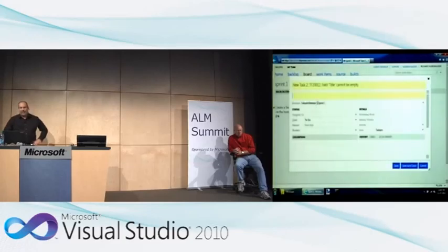Let me just bang out 2 more quick ones. So someone needs to actually build the Twitter control. And you can have a discussion now during sprint planning. Do we buy that or do we build it? Because there's a lot of Twitter controls out there in open source land or tool vendors rather than build it yourself. So, maybe we make the decision we're actually going to create one, and that's 8 hours of work.